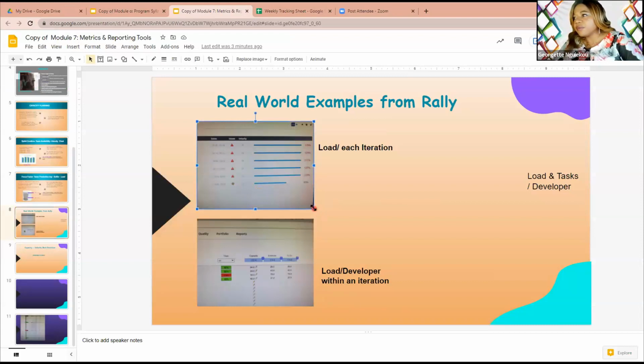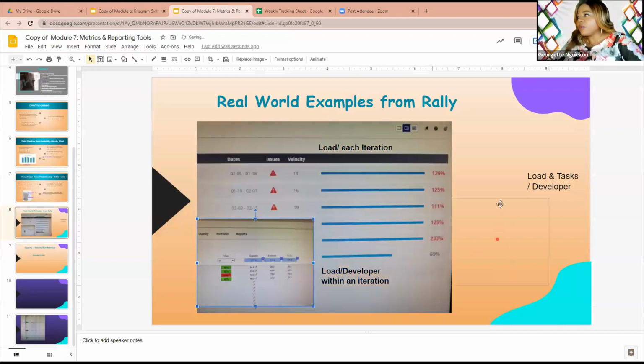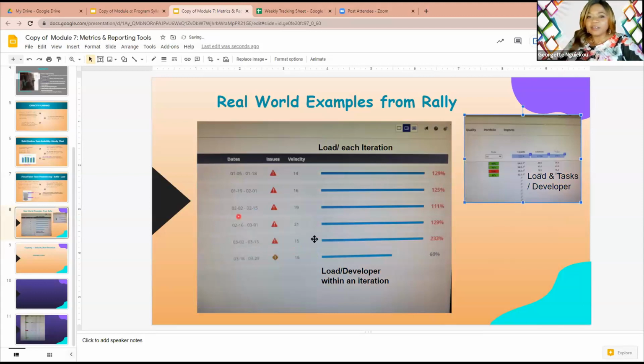You see this one here is, for instance, if you are in the Scaled Agile environment, you see that everything is planned ahead. During the PI planning, you and your team have already planned a little bit about what has to happen during all the 6 iterations. These are different iterations, right? Now I changed the word. I was saying sprint, but I said iteration because I'm speaking SAFe words now. So you see, this is iteration 1, iteration 2, meaning sprint 1, sprint 2, sprint 3, sprint 4, sprint 5. So it takes like 6 sprints of 2 weeks.